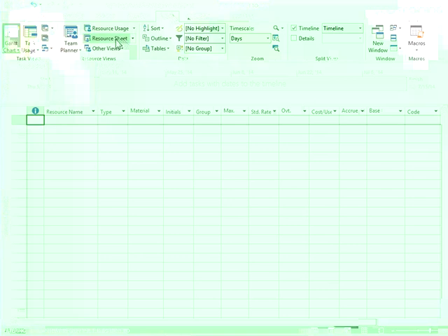So let's say first, my resource is the project manager. What type of resource is it? Well, my choices are work, material, and cost. My work or my people. All right, my work or my equipment. All right, so it's a work.